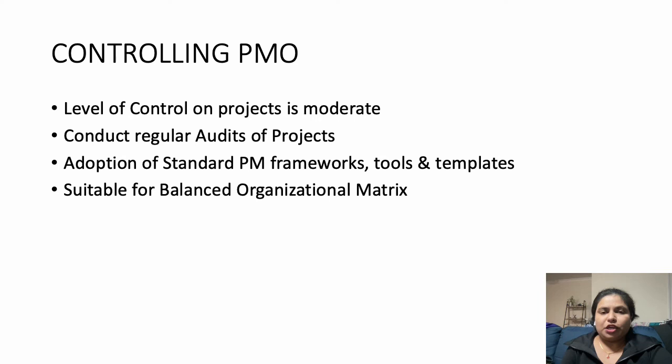The standards would involve, first, adoption of particular project management frameworks or models, for example, the Project Management Institute (PMI) framework or the PRINCE framework. Second, use of particular templates and tools in the project documentation and implementation. Thirdly, conformance to governance frameworks such as organizational policies, government rules and regulations, etc. This type of PMO is also suitable for balanced organizational structures.